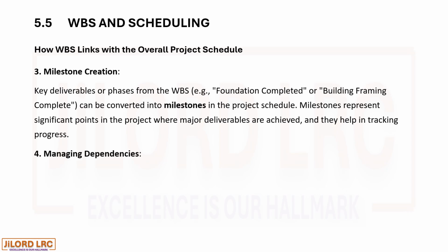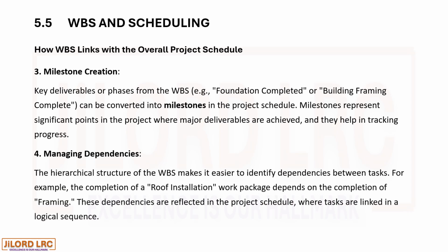4. Managing dependencies. The hierarchical structure of the WBS makes it easier to identify dependencies between tasks. For example, the completion of a roof installation work package depends on the completion of framing. These dependencies are reflected in the project schedule, where tasks are linked in a logical sequence.